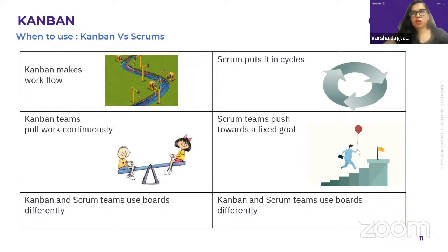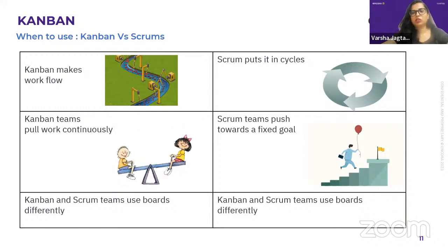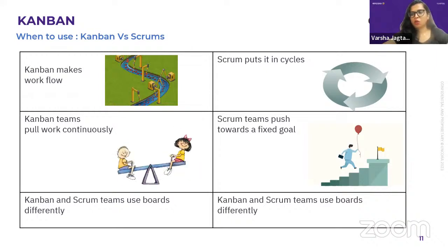Over the period, I will try to set a sprint goal for what a particular team is delivering. There we talk about story points, but in layman's language I would say 100 hours of work. So I would also utilize that board for further planning: this team delivers 100 hours of work. So when my next chunk of work or next user story comes, what I call velocity of a team, here I would say capacity. What capacity does that team have to deliver that work?